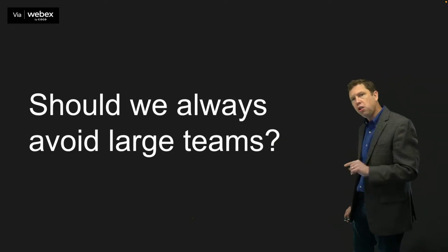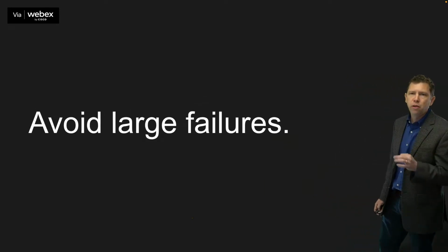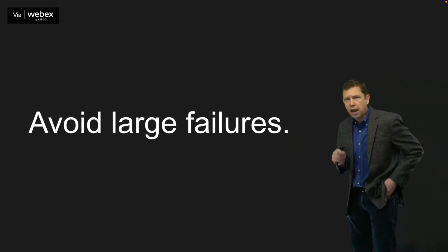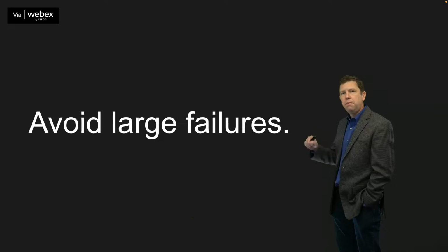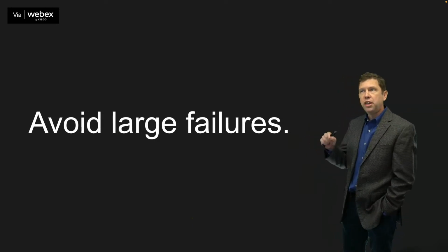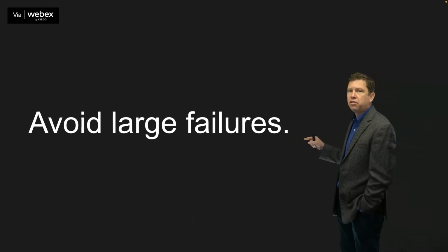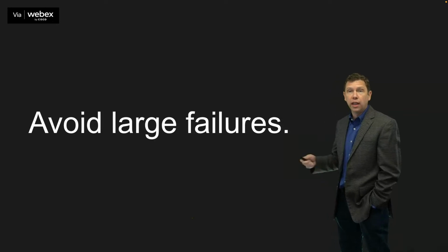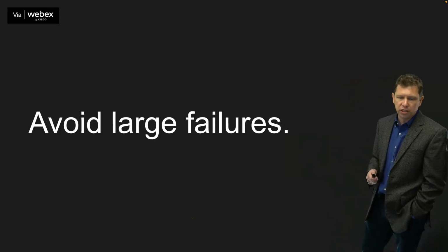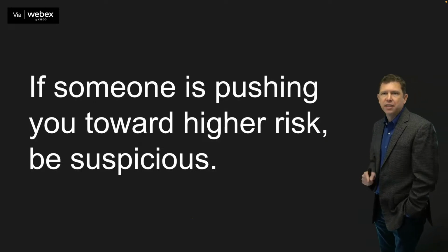So should we always try to avoid large teams? I would say no, but we should try to avoid large failures. There are times where a large team might be valuable, but if you go to a large team when you're still at the point that it will obscure the small failures, then you're setting yourself up for likely having a big failure later on. You're not going to be able to see the small stuff and adjust as you go. If someone is pushing you toward higher risk, be suspicious.